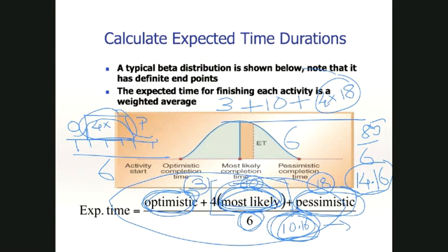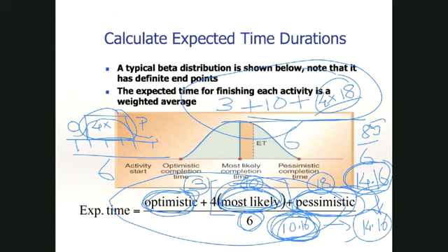But the higher the uncertainty, and this is purely my humble opinion, add greater weight to the more pessimistic set, because in this case you will be budgeted for 14.16 minutes versus 10.16 minutes, which means you'll have another 4 extra minutes of budgeted resources accumulated, just in case things go wrong.